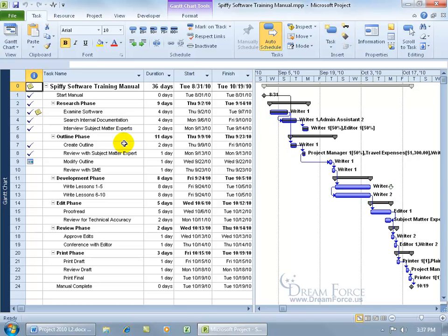In any case, once you learn how to group, no matter what you're doing it by, you'll pretty much be able to get the concept and group whatever you want. So here, I want to group cost by budget type, which means I want to compare the incurred costs thus far to the budget costs. Because as you're going through the project, and let's say that you're incurring costs really fast, and your project is far off from being completed, well, that's a red flag. I don't want to run out of funding before we complete the project, in which case I can quickly go to the client and say, hey, we need more money, even though we've burned through most of the cash here. Otherwise, you're not going to get your project done.